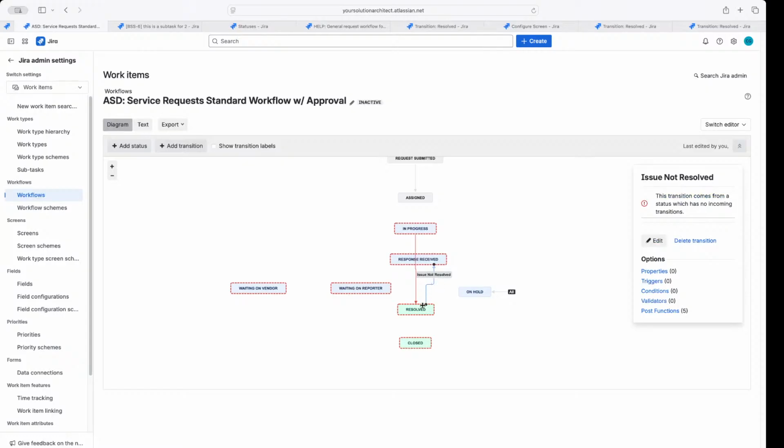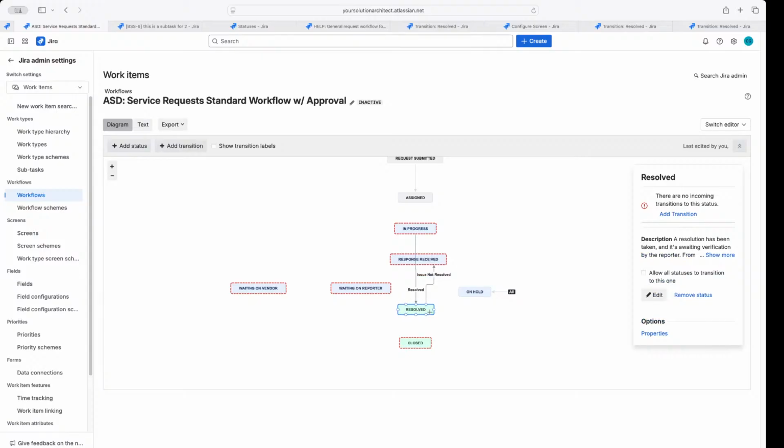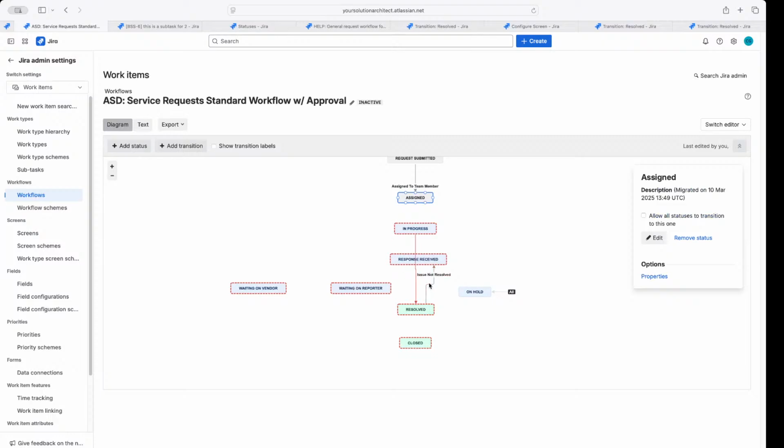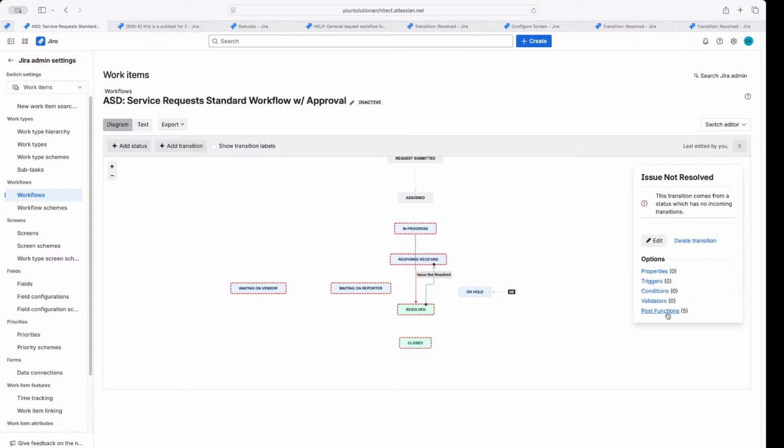Beautiful. So now because we're going backwards in the workflow, we need to remove the resolution. Otherwise, it's still not going to show on your board in your open queue or in your open boards. So it's important that if you set the resolution, you double check that it can't go from a resolved, kind of done status backwards in the workflow. Because if it can, we need to also wipe it. We need to remove it, okay? We're going to do the same thing.